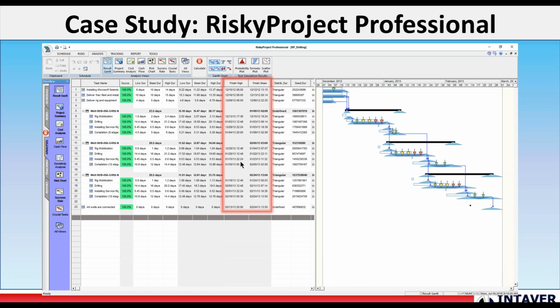As a best practice, we want to put schedule margin in at the deliverable level or activity level rather than having margin for the entire project. So once an activity or a deliverable is complete, that margin is retired. So we don't tag it on to the end, because then we'll start to get a huge amount of slack, especially if you're on time.